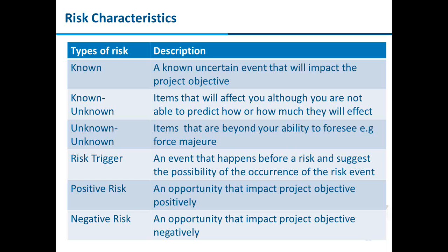Let's assume 8 months down the line we had taken some X conversion factor of the dollar, but down the line you see the rupee getting devalued and the dollar price rising. That is a trigger which is going to impact your cost and your profit margin, and it percolates down to a level which we need to evaluate in a proper way.